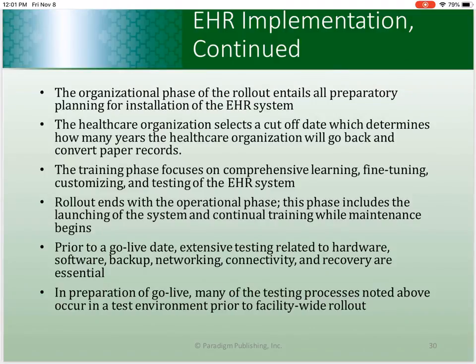Now, on your go-live date, again, I talked about doing pilots. You could do slow rollouts, where you start with one function of an EHR system, and then slowly you start adding more functions.